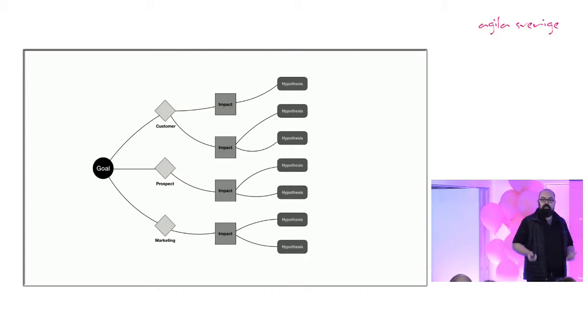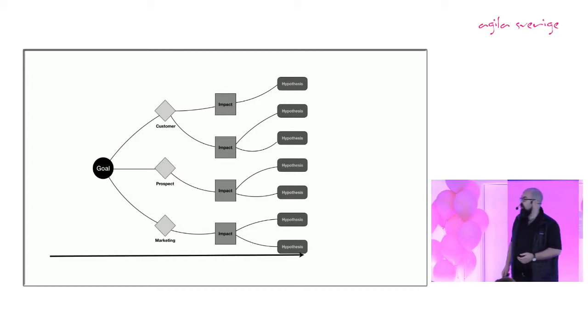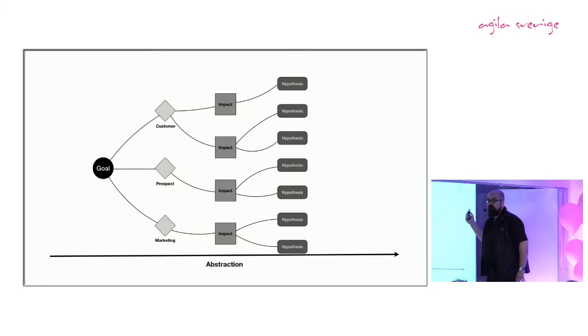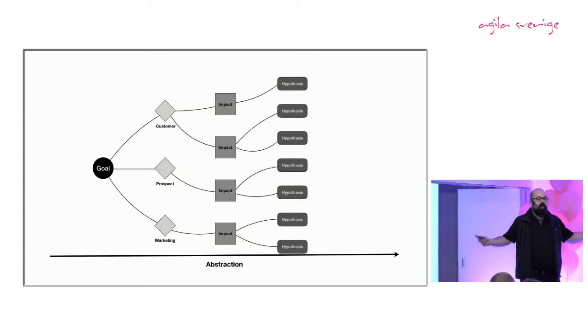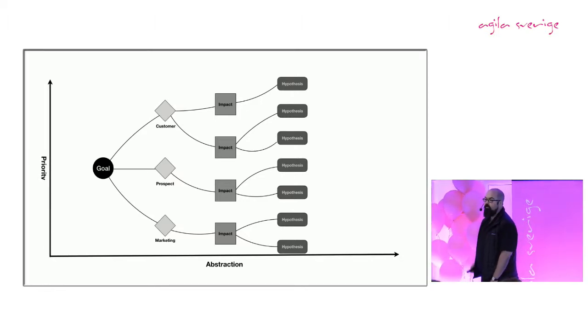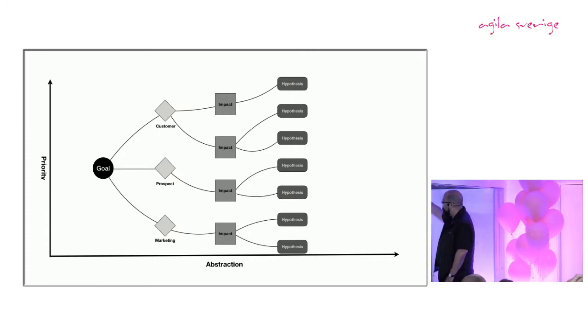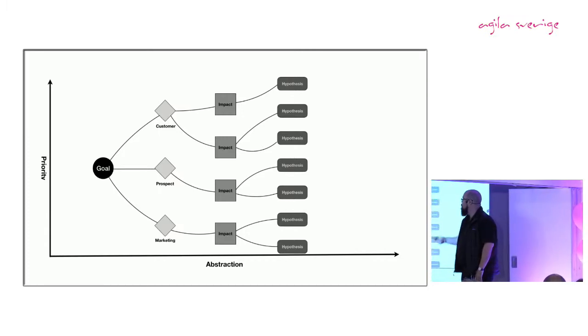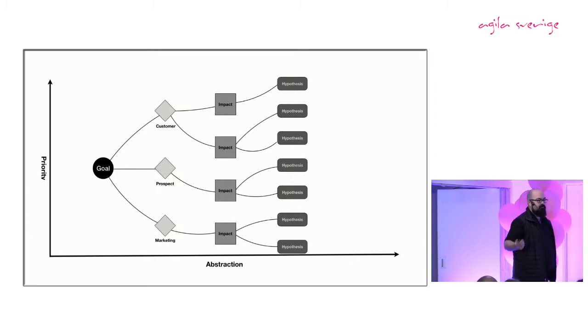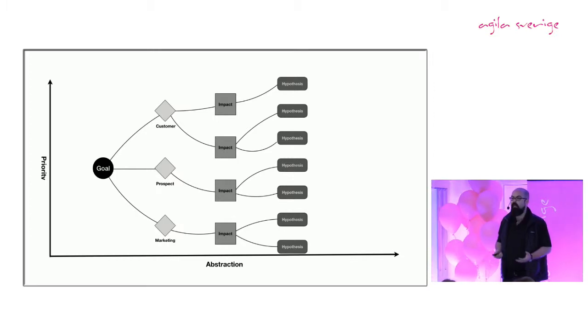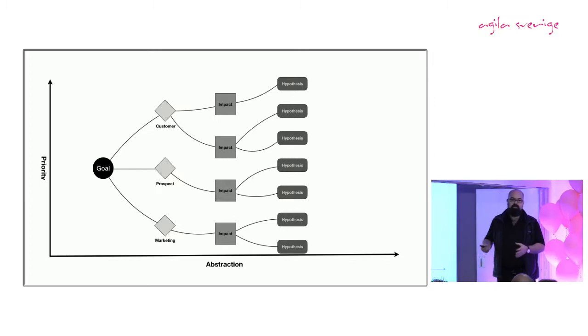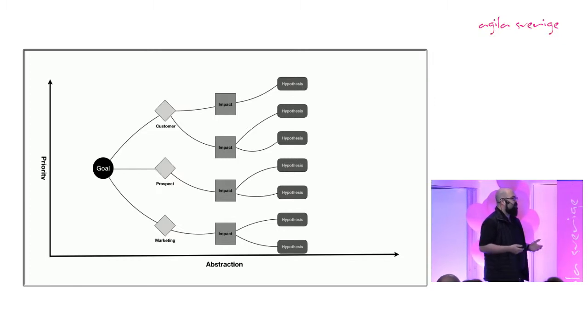But we can change that. We can add in an abstraction axis at the bottom and we can say going from the left to the right takes us further and further away from our goal. Things become more abstracted and we need to understand how we get back to that goal. And then we can set a priority axis going up, so the things at the top are the things we think are the most important. And that covers your deliverables and hypothesis, it covers your impacts, your customers, your goal. What is your most important actor? In this case it's the customer. What is your most important impact? What is your most important hypothesis or deliverable? And by having that in place you can sit there and have conversations with your stakeholders around the priorities of things they're doing.